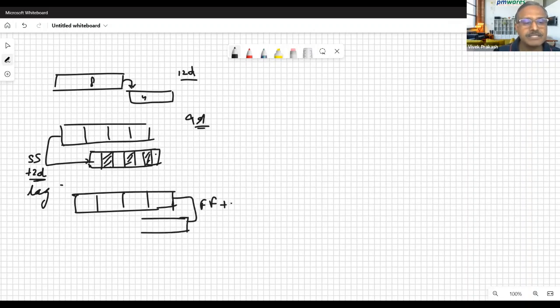Finish to finish plus 1 day. And then I count 1 day, 1 day, 1 day, and here it is 1 day. Right? Now, when it is starting after 2, 2 and 1, 5 days. It was starting after 3 days, 2 days. Now it is starting after 5 days.